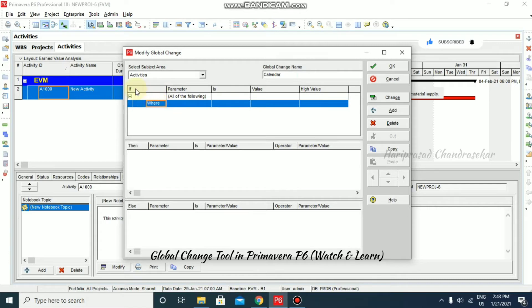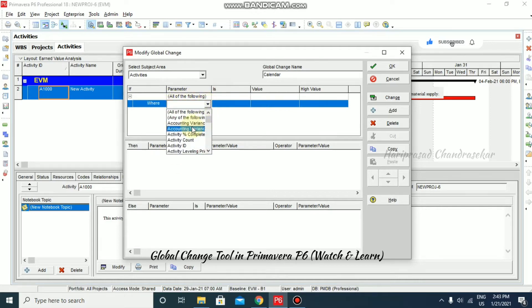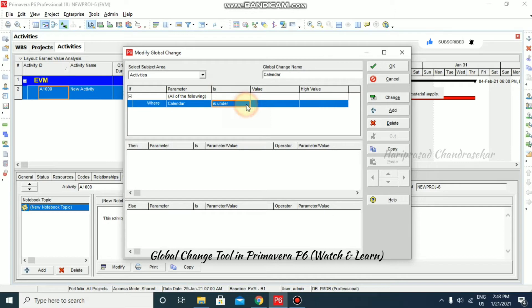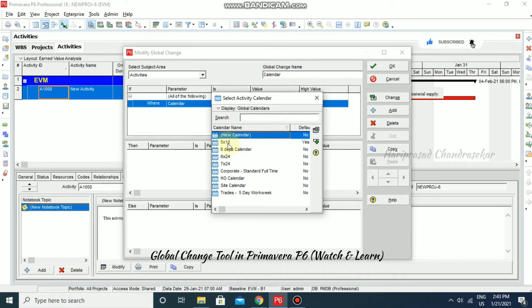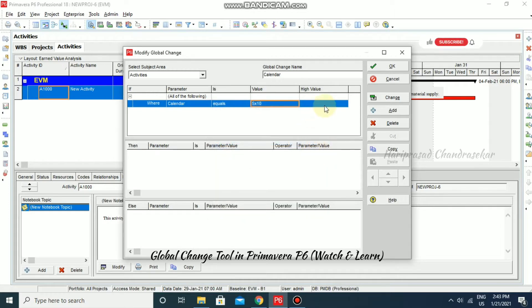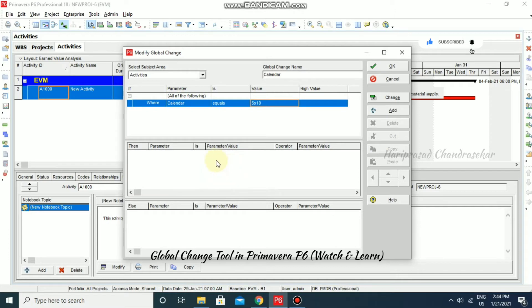If you have some inputs here, we can change something. For example, if I'm working with a calendar, type 'C' and you'll be presented with the Calendar option. In the 'Is' value field, you can go for Equal, Is Not Equal To, or Is Under. I'm selecting Equal, then click Value to select a particular calendar. I'm selecting this one and clicking Select. For calendar, only one value is enough.